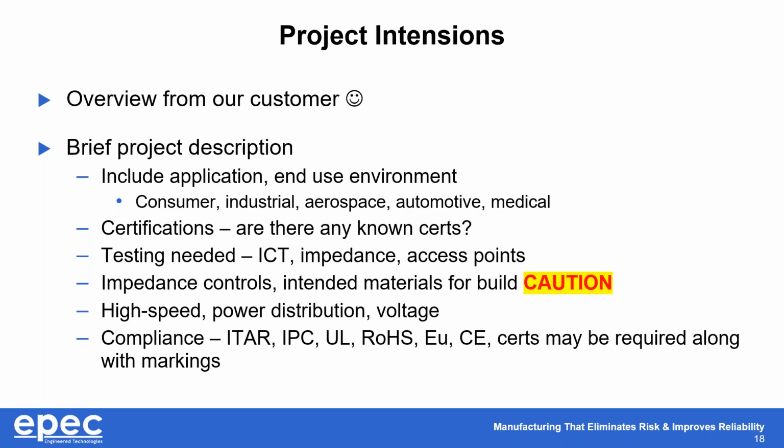I have a caution here, because anytime you directly put a specific material into place, that can come with lead time issues, added cost, availability, and it's not always accessible at all locations depending on the technology of your board. So considering a material, considering an alternate, something else that can work, is better for us all as far as pricing and delivery and lead time.